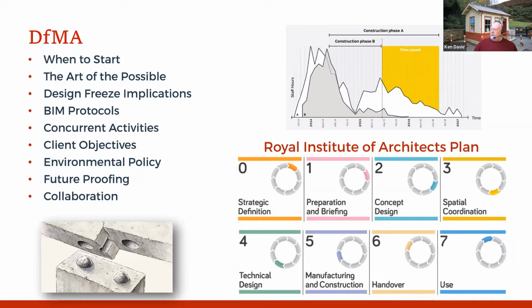Specifications and designs tend to be fixed much earlier to allow the offsite manufacturing to go ahead. There's less opportunity to change. So once you've imposed a design freeze, there isn't a great deal for the designers to do, and that would apply across all disciplines, regardless of the project type. You can see how in a traditional project, there's a huge amount of site queries, site clarifications, and potentially also site inspections.